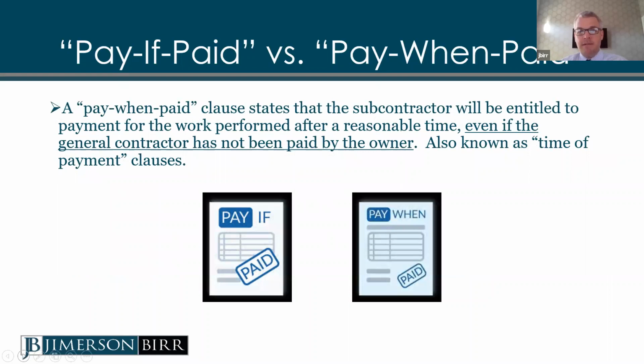Pay when paid is a different provision, and that still requires, in this scenario, the general contractor to pay the contractor within a reasonable period of time. Again, when you have payment provisions in your contract, it's best to spell out exactly when those payments will be made, that they're not conditioned on someone else paying that person before they pay you, and what you have to do in order to get paid. A good contract will spell out all of the conditions that need to be met before payment is made.